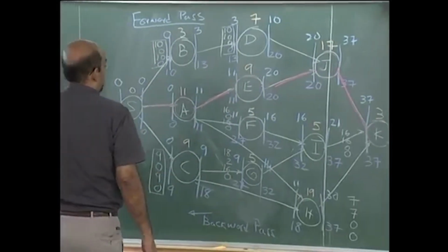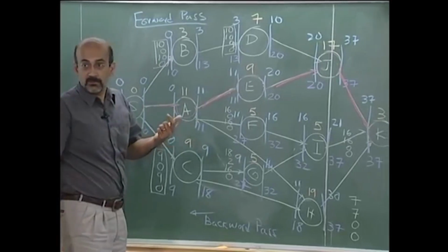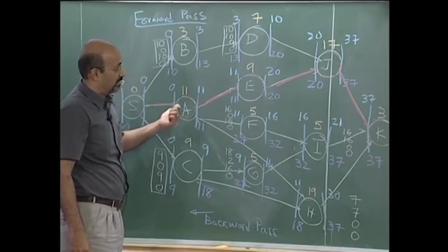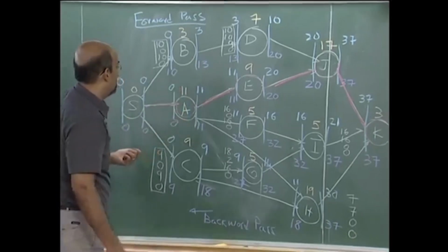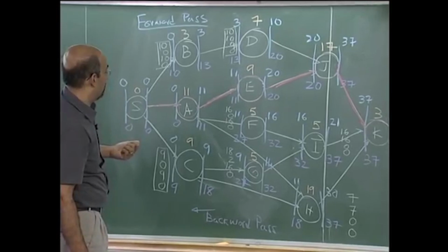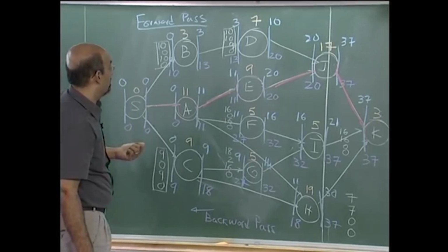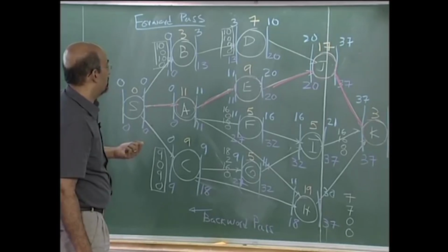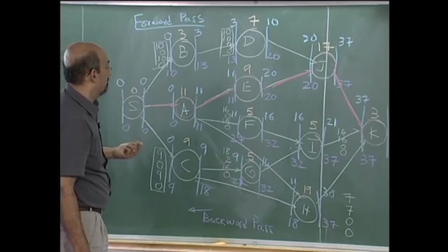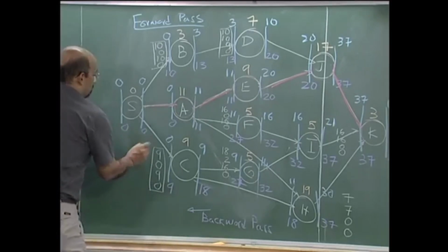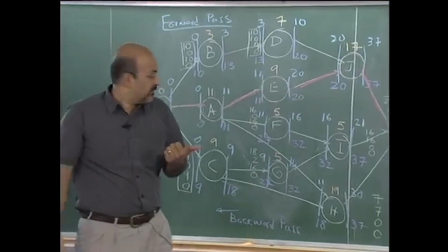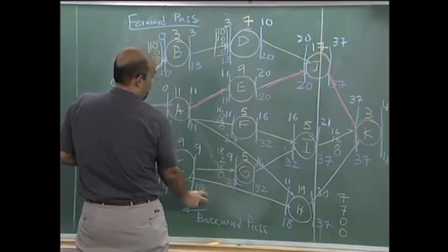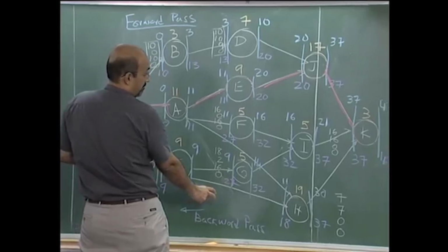Concepts like independent float are not used from an application perspective, but what we probably have to do is analyze one of these with a negative independent float. G has how many days? G has 5 days. But if we take the numerical value, it goes to minus 7. Where are we? 16 minus 18, minus 2, minus 5, minus 7.